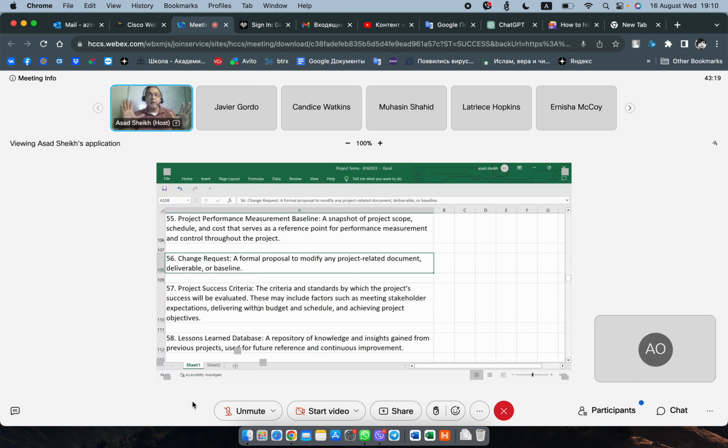If it's a significant change. For an insignificant change like a defect, you take corrective action, you're fine, right? You are running a program, writing a code, and the code bombs. You go in, fix it. That's not a big impact, right? It's just something the team is doing as part of testing. But if something new is required, then obviously that's going to have an impact, and subsequently you may have to re-baseline your triple constraint depending on which of those three are impacted.